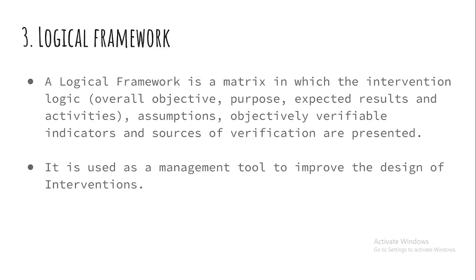My third tool is the logical framework. Of course, you know this is a very important tool also. Some people say it's the Bible of M&E. It's a 4x4 matrix in which the intervention logic, that is the overall objective, purpose, expected results, activities, assumptions, objectively verifiable indicators, and sources of verification are presented. It's a management tool that you use to improve the design of your interventions.